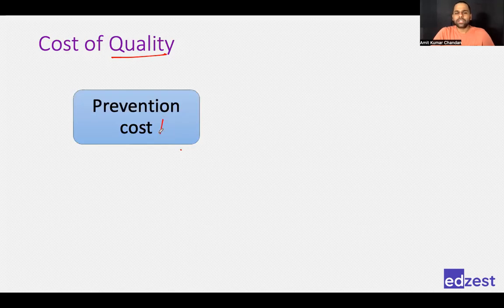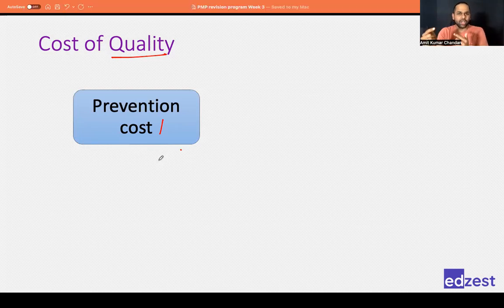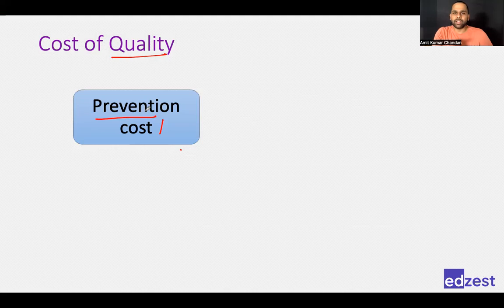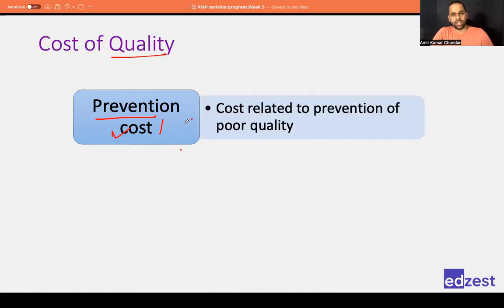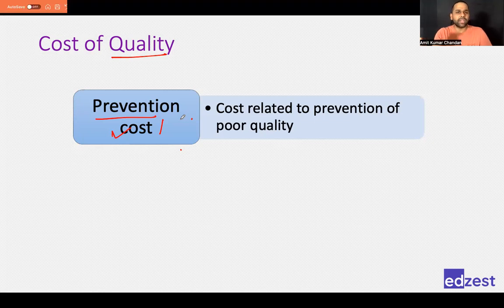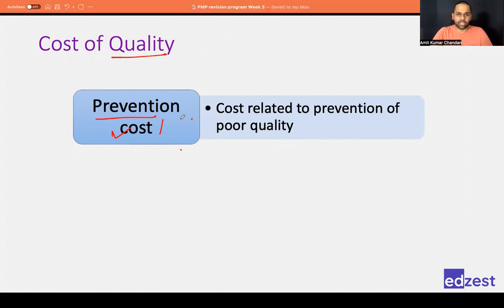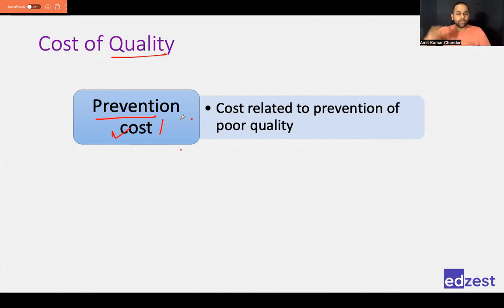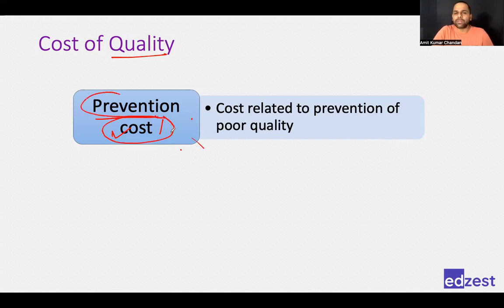Now there are some cost of quality terms we should definitely know for the exam. First is prevention cost — whenever you are trying to take some action so that a problem does not happen, you are trying to prevent it, and that incurs prevention cost. For example, if you think team members will make mistakes, you provide them training; that training cost is your prevention cost. Similarly, improving the packing of material sent from factory to site is also prevention cost.